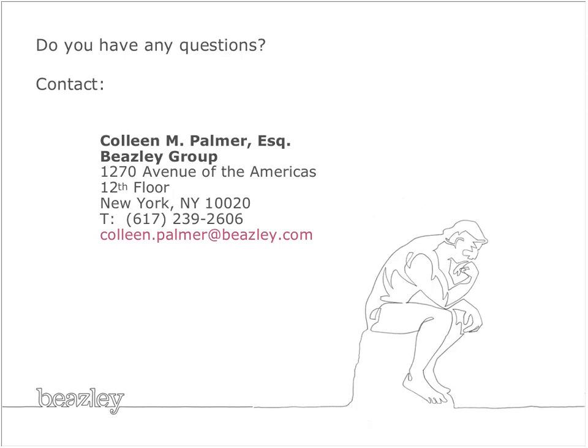So if you are being retained by your client and you have a mutual indemnity, you still want to make sure that you don't have a duty to defend, that the indemnity is limited to your client and its officers, directors, and employees, and that your obligation is limited to the extent damages are caused by your negligence. And I'm okay if the client's obligation to you is limited in that way too. It's more important that your obligation be appropriately based, because again, it's more likely that you're going to be asked to indemnify your client than your client to indemnify you.